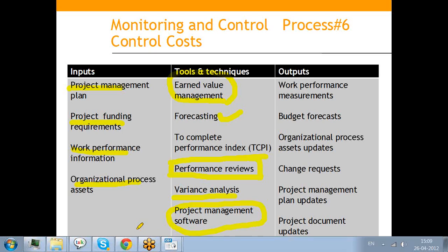For a small project, if you have very big work packages, the project will not show any schedule variance for a long time. For a 6 month project, if your work packages run for 2-3 months, the project may not show schedule variance. So that is not okay.